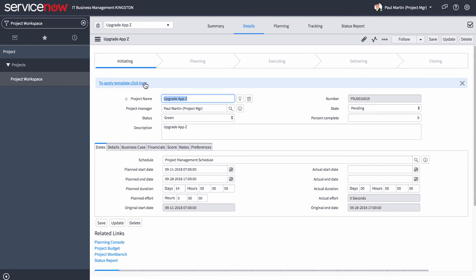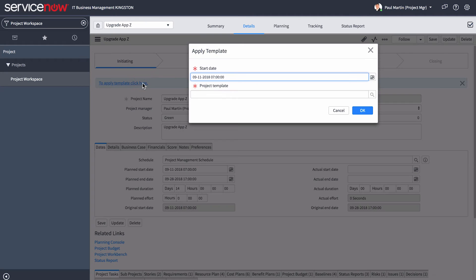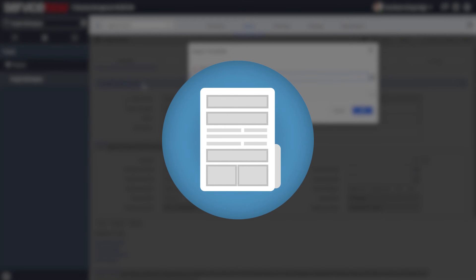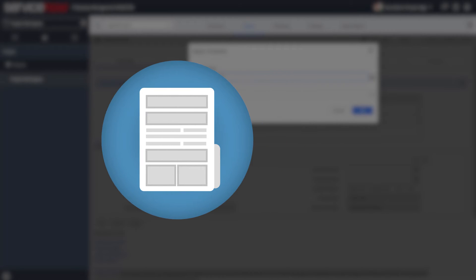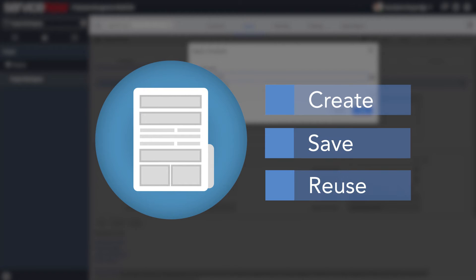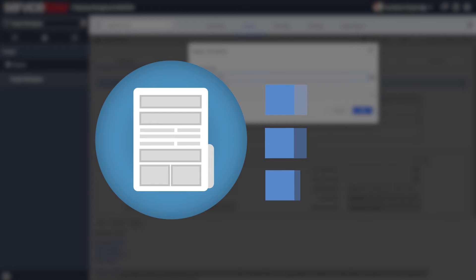Let's begin by applying a template. The Project Template feature gives you a simple way to create, save, and reuse work breakdown structures.